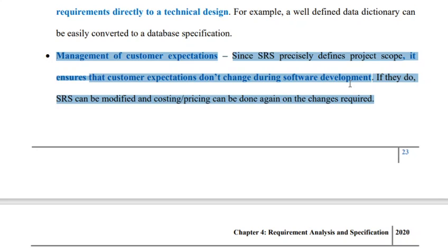So once the set of requirements are agreed upon, it may act as a basis for initiating development further, not letting the customer propose change or bring about an alteration to the definition. So that is one of the reasons why the SRS document is created, right? In order to minimize the amount of change requirements called upon by the customer.